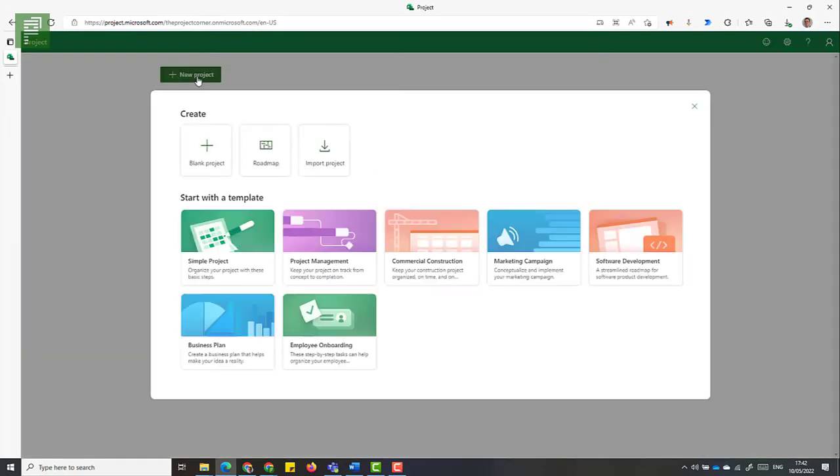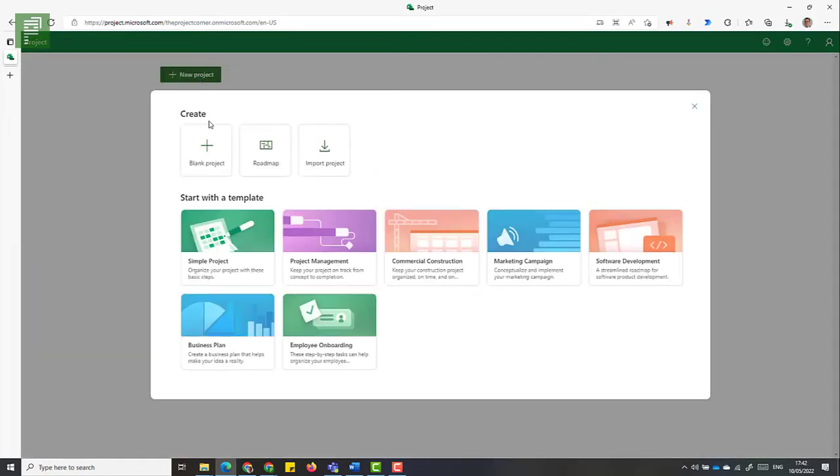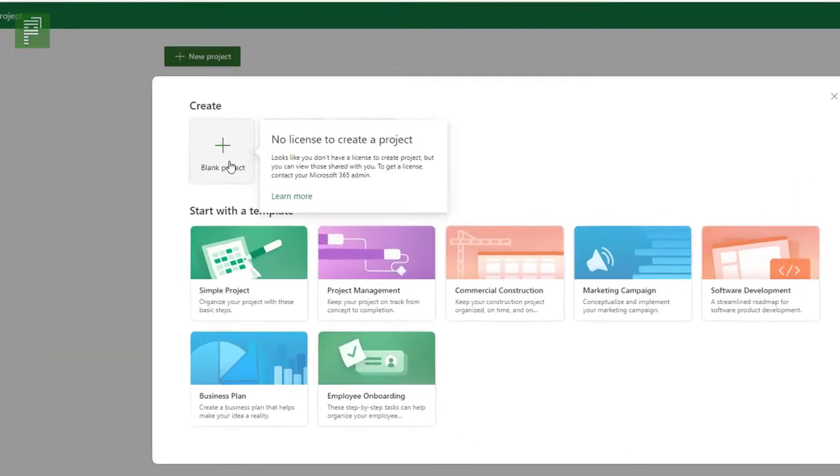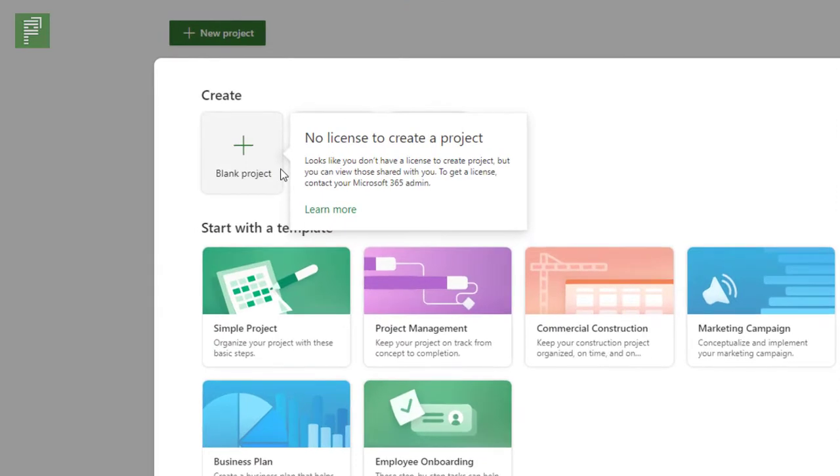And what happens if I don't have a license? I'll get that prompt here. And this is the catch that I was mentioning earlier. If a resource is an external resource to the system, to the tenant, that means that that user doesn't have the license to create projects in this tenant.